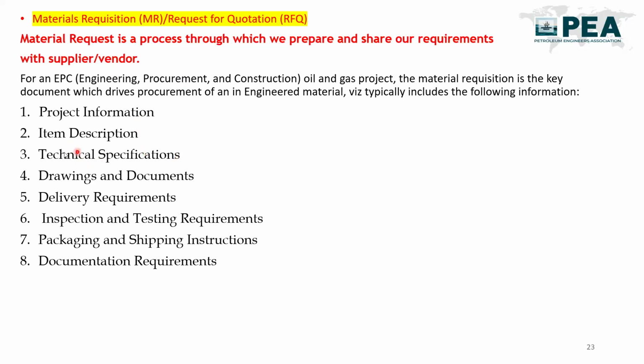Then the technical specification: what are the technical requirements of the material which we are going to procure. Any drawing or document of that material we need to attach with this MR. Any specification, any standard, we need to add with the MR. Any client reference or client specification we will also add with this MR, so that at the end of the day the vendor should not deny it, saying this information was not shared with me, so I was not aware of that.